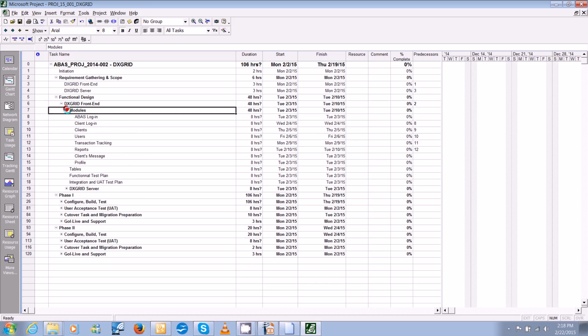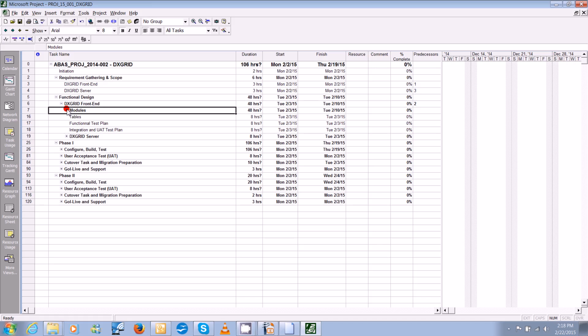And in the blueprint, if you want to track other things for a given project, then you can track them at that level. But always do note that anything that takes less than 8 hours, you should not track in the project. You can just put it as a task that you track with a higher level task, so that your project plan does not become so big that you cannot handle it. So anything less than a day, you should not track. But make sure that those are captured at a higher level.